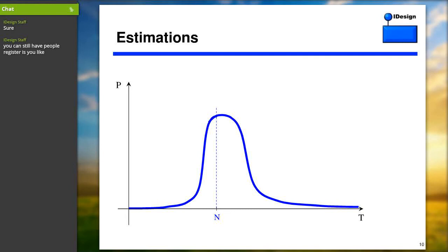On the other side of the nominal, are you going to be shocked to learn that the year's project has taken 13 months? And the answer, of course, is no. Because you're not going to be shocked, that's another way of saying probability is high. So if you go a bit to the right, probability stays more or less the same. But what about giving a year's project 2 years? Well, then gold plating and Parkinson's law will kick in. Probability of success would actually decrease again.